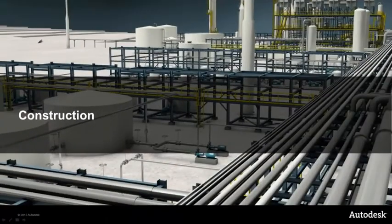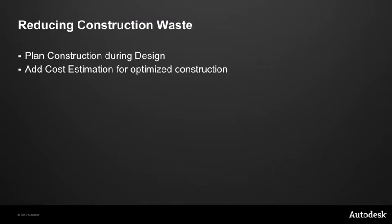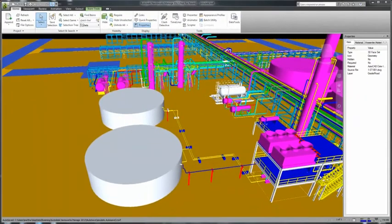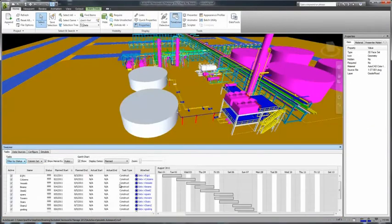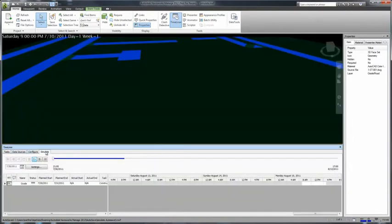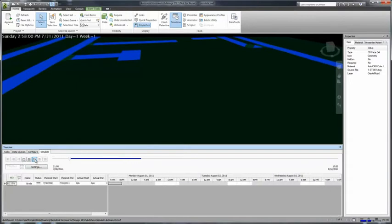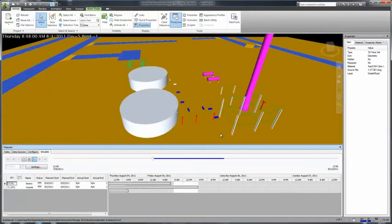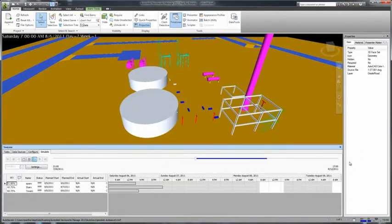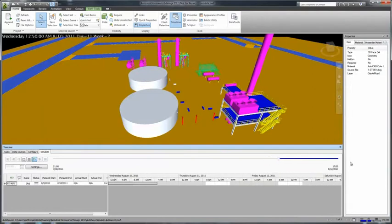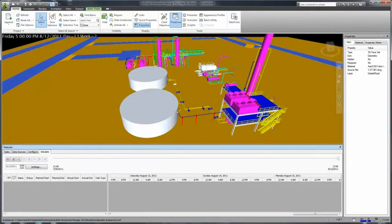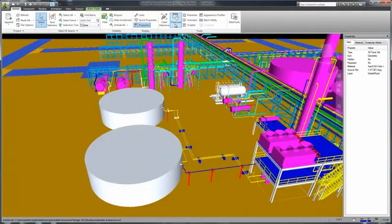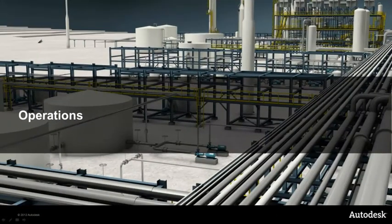So now let's take a look at construction. In construction, we're particularly concerned about reducing waste. So one of the things that we can do using Navisworks in the plant design suite is to plan our construction while we're doing the design. In the new 2013 Navisworks, we have cost estimation as an added feature. So now here we are back in Navisworks. This time we're going to use the Timeliner command to actually create and demonstrate how we can show a construction sequence. We've used data sets that came from the model and assigned particular tasks to them and date for start and finish. And then we played this back in Timeliner, which shows us then our design sequence. Interactively, we can move around and determine whether to change our sequence.